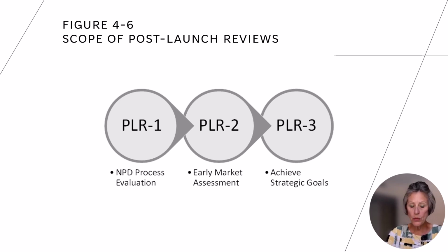The first post-launch review, PLR1, is conducted at the time that the product is commercialized, Stage 5. The purpose of PLR1 is to generate learnings from the NPD team, such as behaviors and tools that were particularly successful, or not, in executing the innovation effort. PLR1 focuses on people and processes leading to improvements in the staged and gated NPD approach.